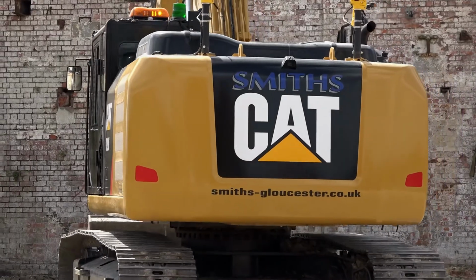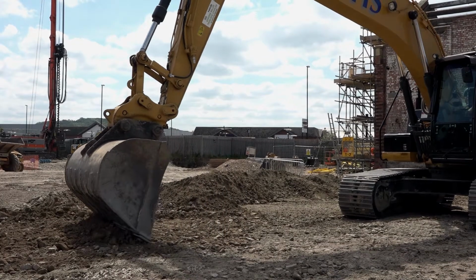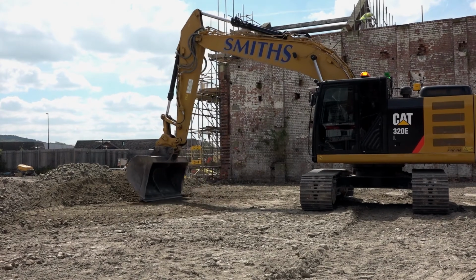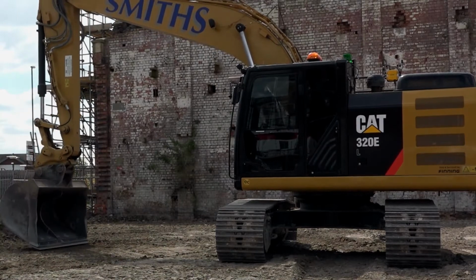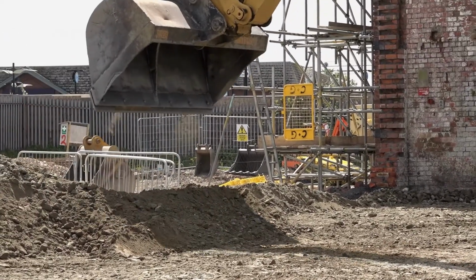From that Business Centre software, we're able to look at cut and fill elements of it, so we can go out and do a survey at the beginning of the job and look where we've got the most cut, so we know where we need to take the material from and place it on site. That's something we used to have to send out externally previously, but now we've had the training from SITECH, we can do that on Business Centre ourselves.